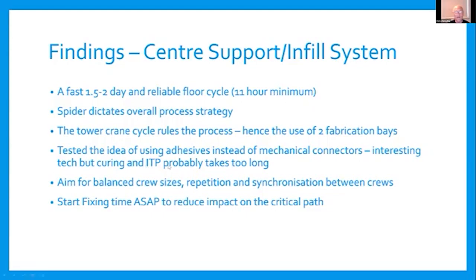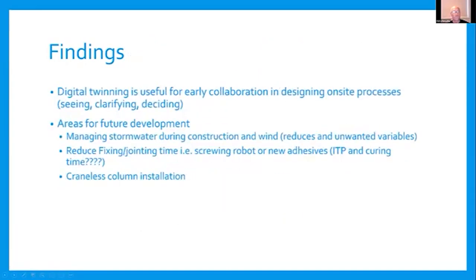And then the inspection test plans may also take increased length because you may need to do some level of lab testing. That's unclear at the moment. And if you do, that's more or less a separate subcontractor in the process. They have to wait for their results, which may all add to the floor cycle. As mentioned, aim for balanced crew sizes, repetition and synchronization between crews, start fixing as soon as possible.